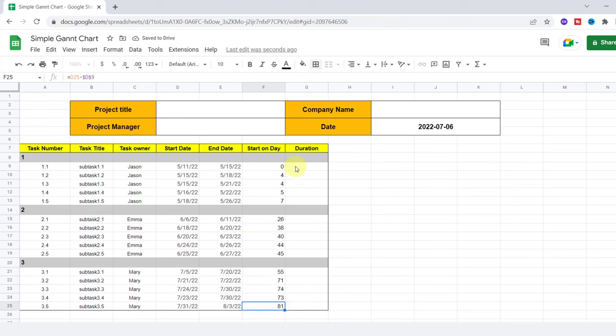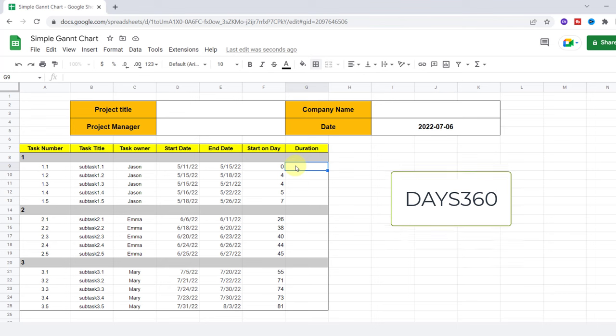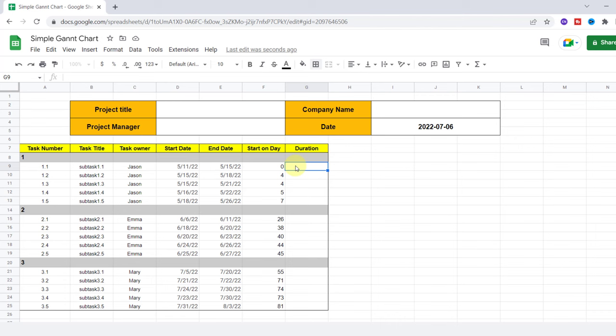In the duration column, I want to figure out how many days each of my project's tasks will go on. So I use the DAYS360 function. The DAYS360 function returns the difference between two days based on the 360-day year.